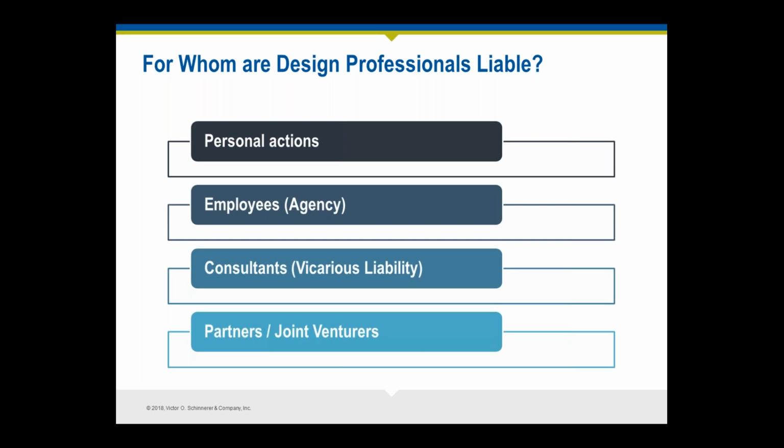So let's say again, this mechanical engineer had a claim and they did have insurance, but they had a limitation of liability on their contract with you that limited their liability. Let's do the standard one, $50,000 or the amount of the fees, whichever is greater. And their fees were less than $50,000. So they might say to you, yes, we know we're responsible, but we have this limitation of liability clause in our contract with you, so we're willing to pay you $50,000, but no more than that. And the claim might have been $250,000.